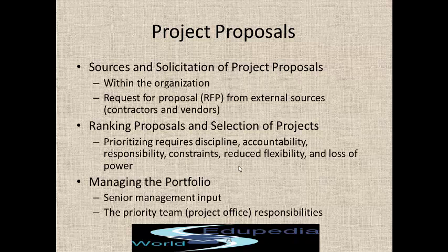Once you give the go-ahead, the vendor will have to work on the project as per your project requirements and deliver as per your guidelines. So you will have service level agreements and contracts to ensure that they deliver on time. In case of delays, there may be a penalty clause they will be aware of, so that they also deliver on time.